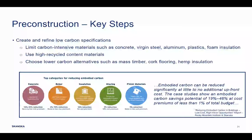When asked about cost, the main question we always get as general contractor is: what's the cost premium? I want to highlight a study we did with Rocky Mountain Institute last year. We looked at different case scenarios and found that embodied carbon can be reduced significantly at little to no additional upfront cost. Our case studies show that embodied carbon savings of 19 to 46% can be achieved with less than 1% cost premium. As a rule of thumb, we typically say up to 30% embodied carbon reduction in any project can probably be achieved through no-cost or low-cost solutions.